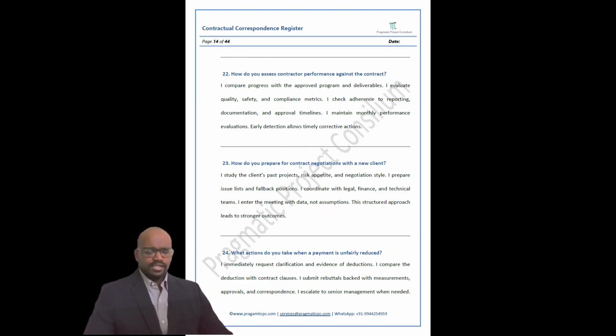Once the negotiations start, within 10 minutes you will identify the style of negotiation, whether they are aggressive pushers or assertive seekers. Try to be very fair. If they are very aggressive, try to repel them with facts, not emotionally. Tell them that if you are transferring this risk, these are the consequences, and these will increase the prices, and we have to take a contingency cover on that. So this will affect you indirectly.